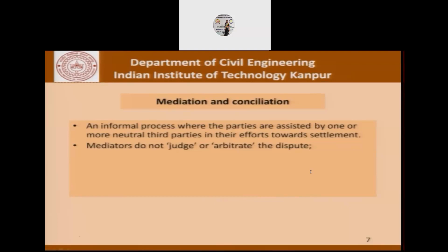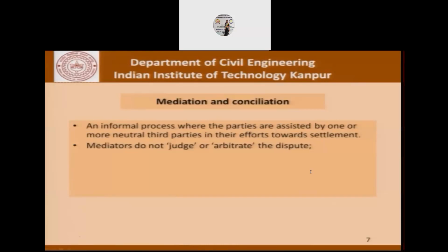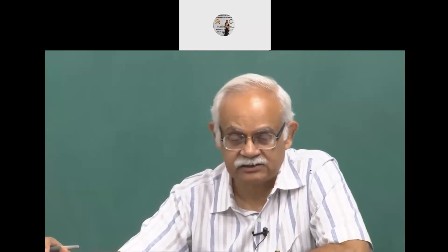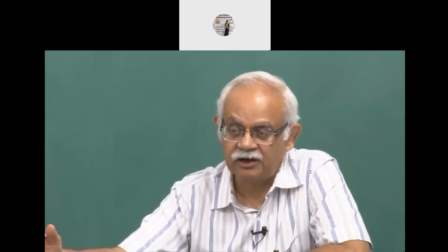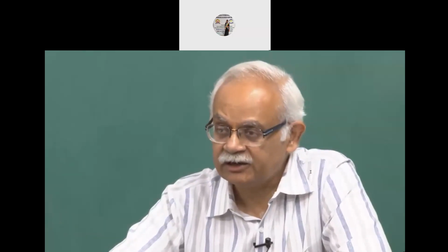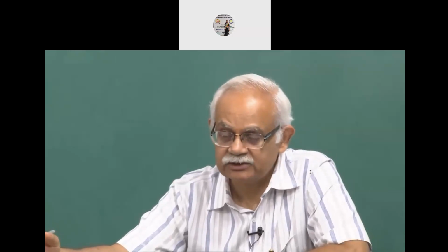Understand mediation is not the same process as arbitration. Arbitration has certain very legal overtones. We must recognize the fine line between mediation and conciliation, which are not legally binding and have a much lower standing as far as legal sanctity is concerned. Arbitration is a quasi-legal process, and only arbitrators have clearance to apply rules of evidence and so on. They can carry out the process of arbitration, which is one step short of litigation.